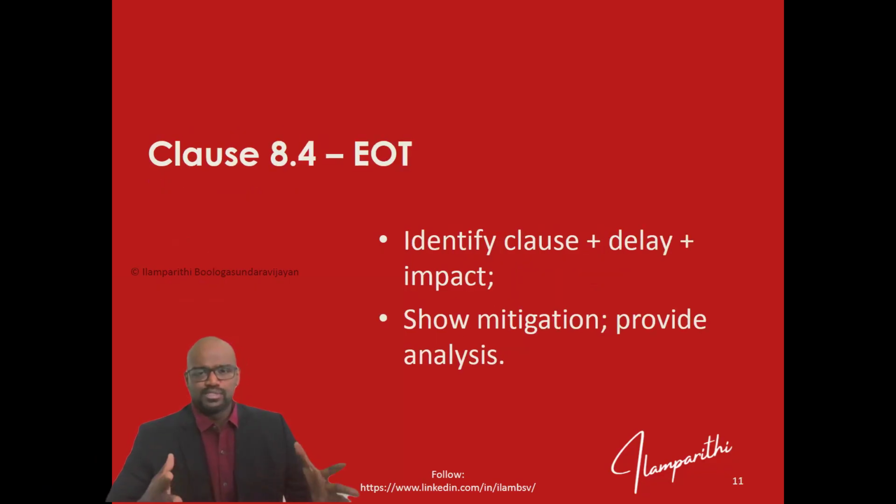Class 8.4, this is the most important class because it directly addresses the EOT. So, what is your entitlement under which of the classes we discussed before? Take the class, take the delay impact, and do a delay analysis to prove that you have an extension of time entitlement, and also show the mitigation. Mitigation is not optional. Mitigation is mandatory.